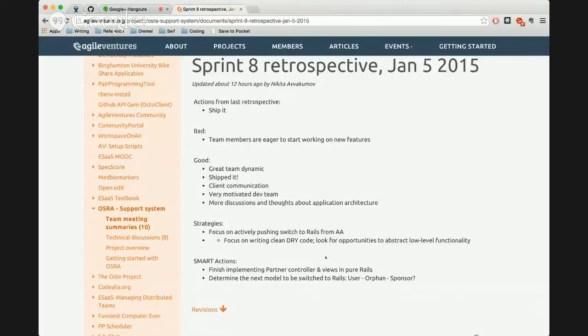It's probably not prudent yet to start development on new features, new stories. So we will postpone starting on phase 1 for some time. Plus, the other requirement is that we need to plan phase 1 with the client, prioritize the tasks that will go into it, etc.